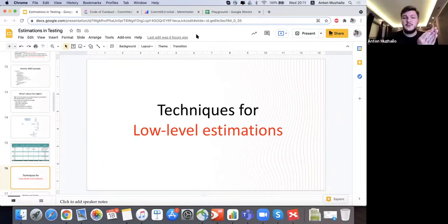You can do it in this way. Estimate everything except this one, and contact somebody who can tell you the estimation, and ask, how do you think, how long will it take? And put this number into your picture. It won't spoil your bigger picture much, because I guess this piece could be 10 times smaller or 20 times smaller than your entire picture. And it's like a little noise. If this person gives a wrong estimation, no problem. It wouldn't change the picture that much to spoil your estimation. So it's completely not a problem.